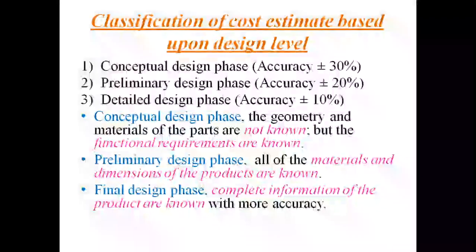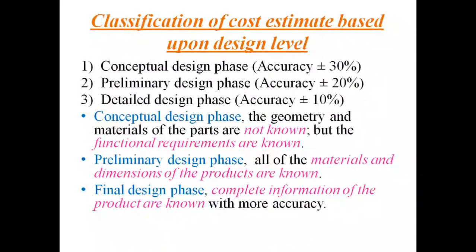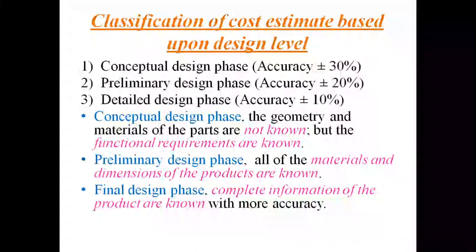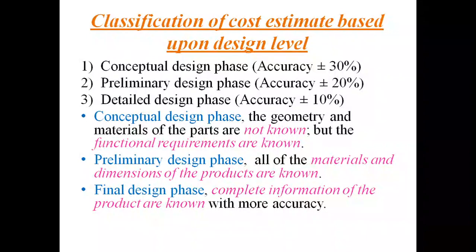The accuracy of final design estimate is plus or minus 10%. The cost estimating methods used in this stage are detailed cost function method and traditional approach.